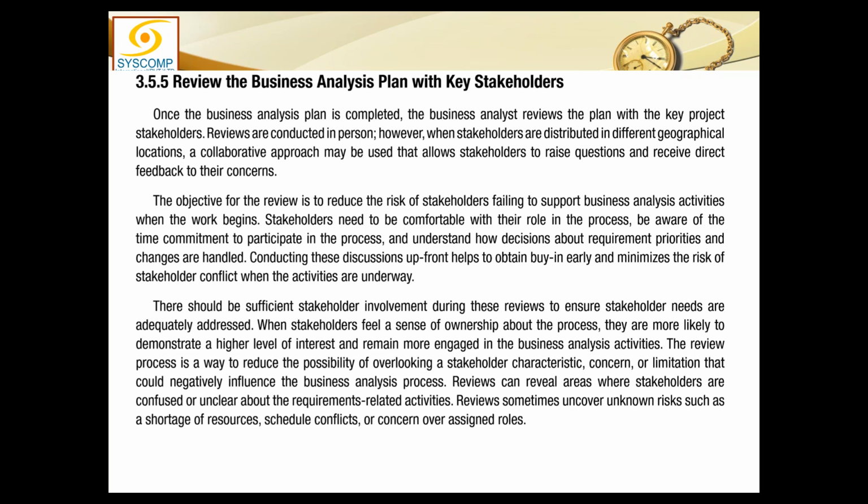The objective for the review is to reduce the risk of stakeholders failing to support business analysis activities when the work begins. So we don't want to get into the work unprepared. The stakeholders must be on board, their blessing must be with us, so that we can comfortably get into the actual work of the project. Stakeholders need to be comfortable with their role in the process, be aware of their time commitment to participate in the process, and understand how decisions about the requirements, priorities, and change are handled.